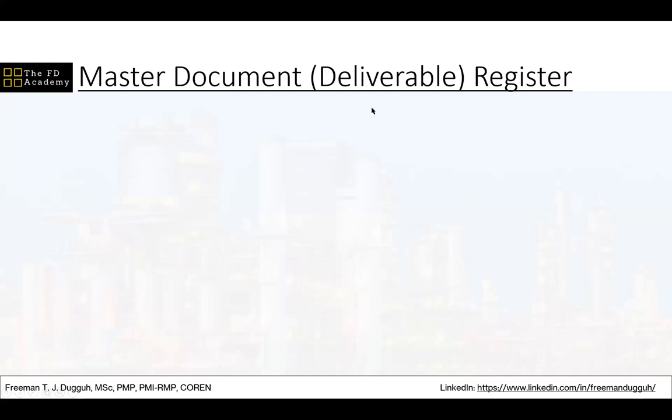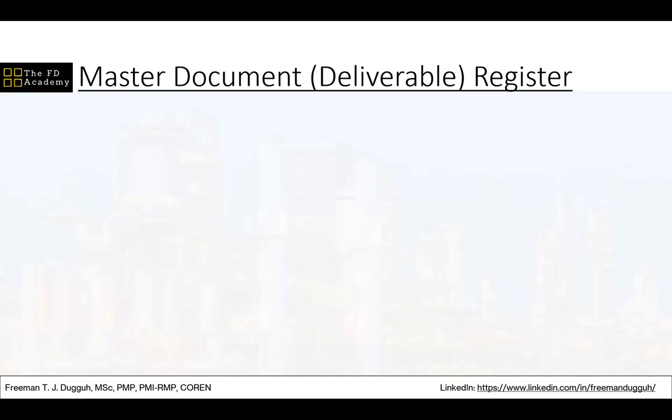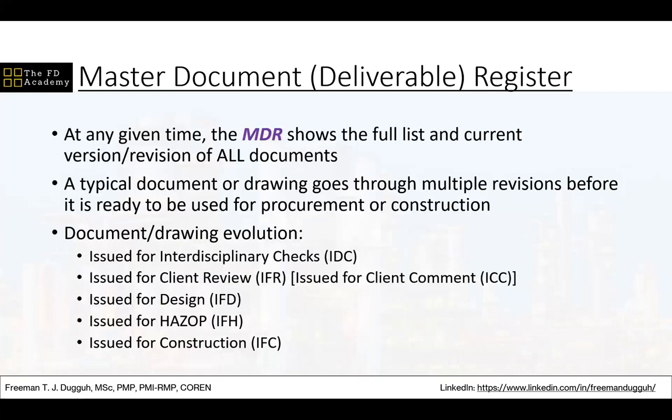So before an engineering project starts in the oil and gas industry, all the disciplines you can see here, process, mechanical, and so on, they look at the scope of work and they determine the deliverables they are expected to create. And that leads to the creation of a document called the Master Document Register, or also called the Master Deliverable Register. So the Master Deliverable Register shows the full list of all the documents. Mind you, engineering deliverables always come